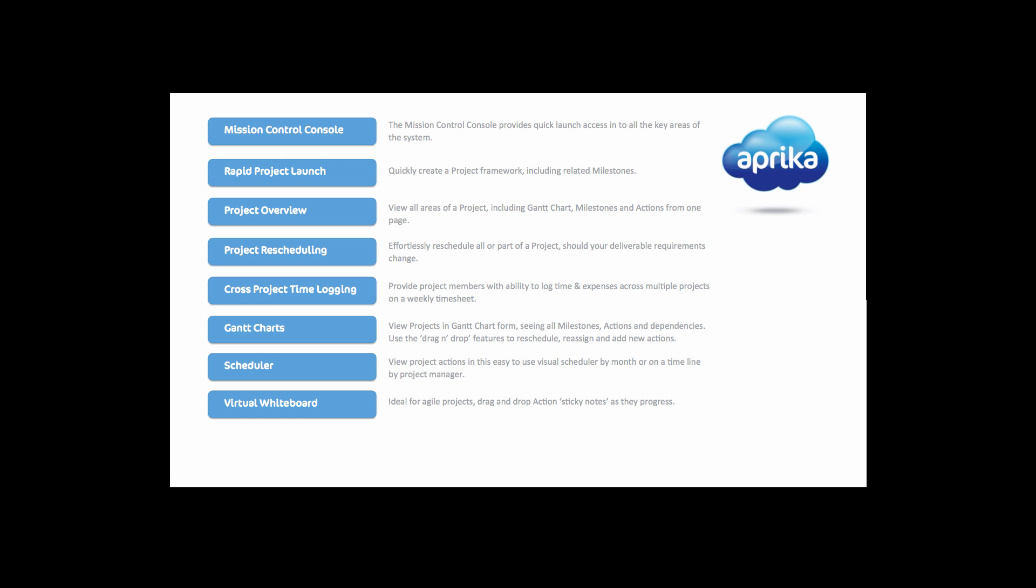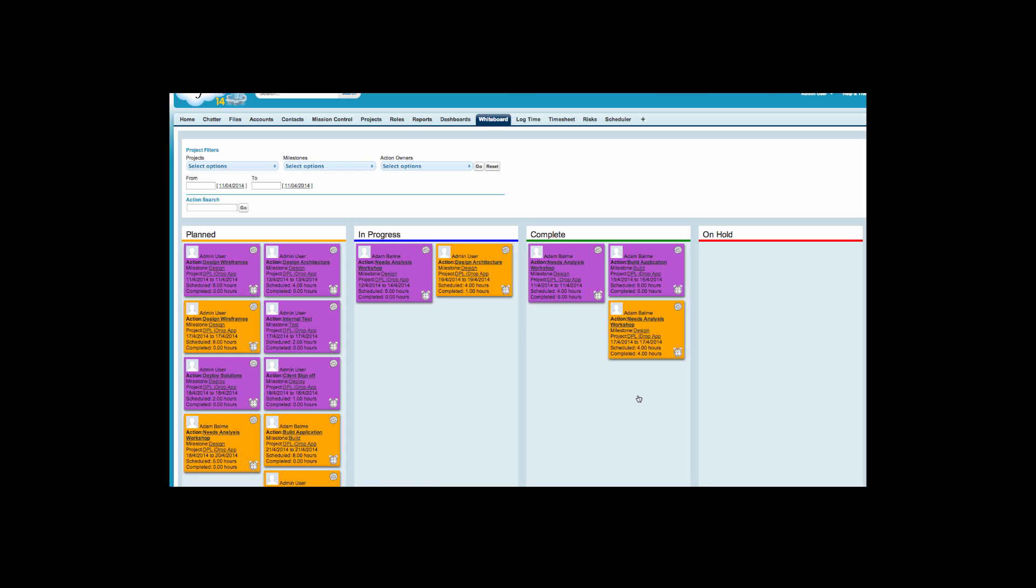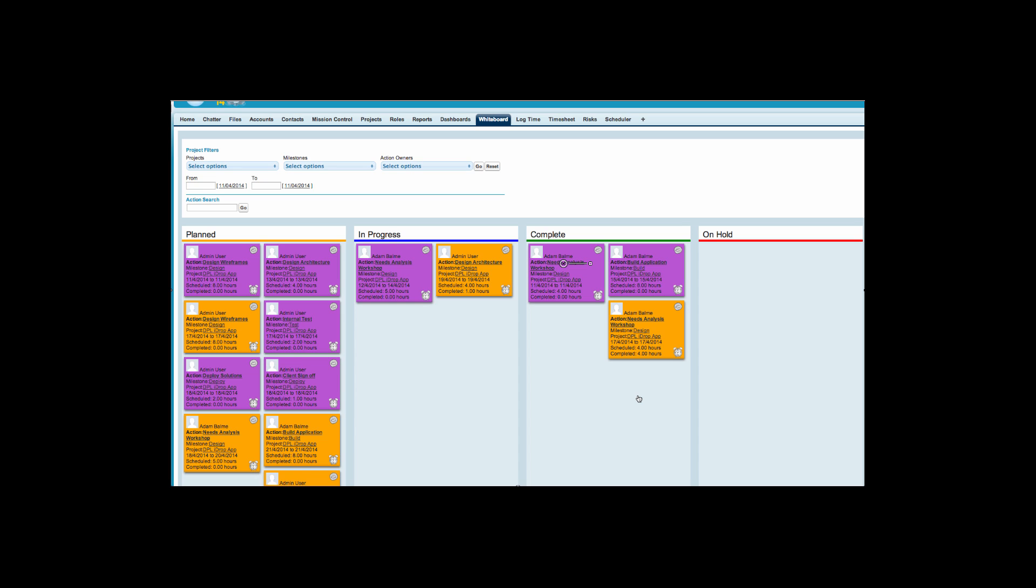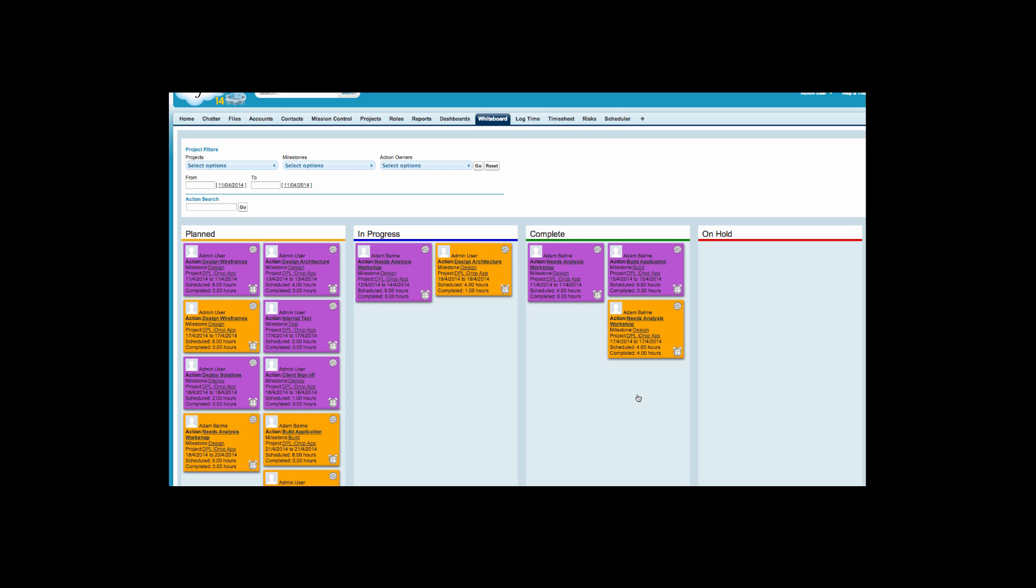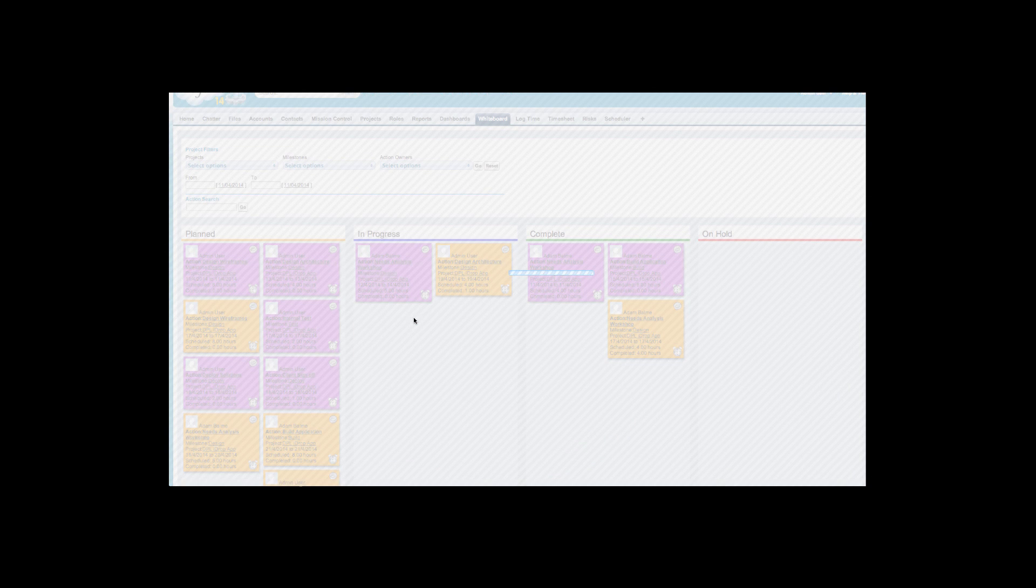A unique feature of mission control is the virtual project whiteboard, which provides you with a holistic view of all actions relating to current projects. All actions have their own sticky notes, which display key information including the action owner and their profile picture, the action milestone and project name, start and end dates, and scheduled and completed hours.